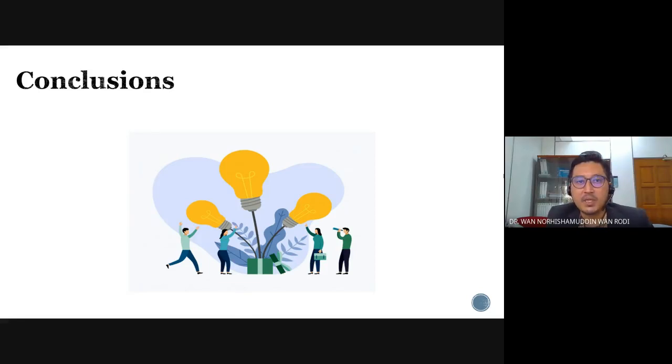So you have to do several tasks of work. Okay, in terms of total development cost, you can also get all the costs from relevant authorities, from the construction cost handbook, and then you have to do a calculation and make sure all the calculation are correct, accurate, and also reflect the proposed project. You cannot simply, for example, your project is residential, but you are using the commercial cost. So it is not reflected with the proposed project. So you need to use a suitable amount of costing.